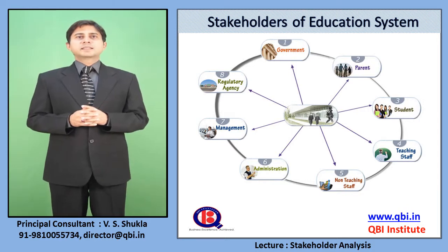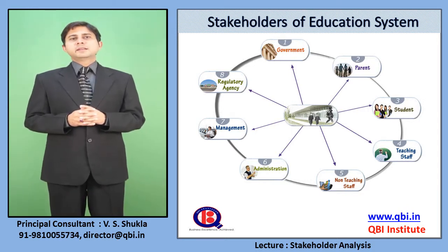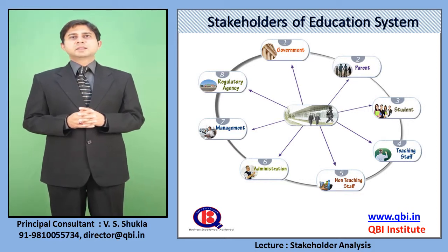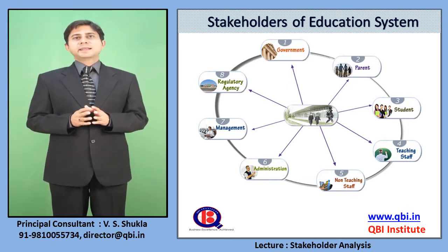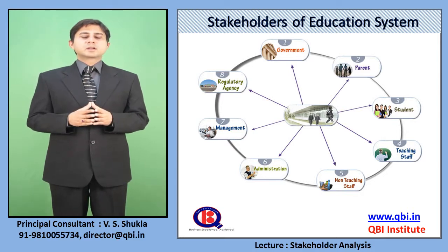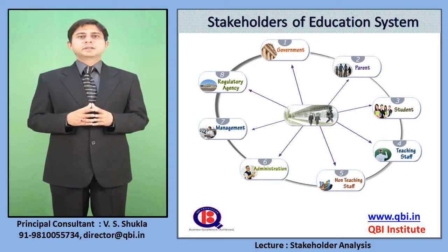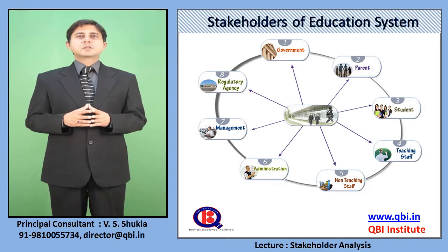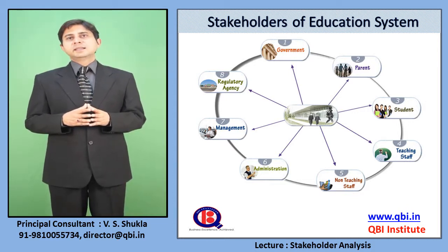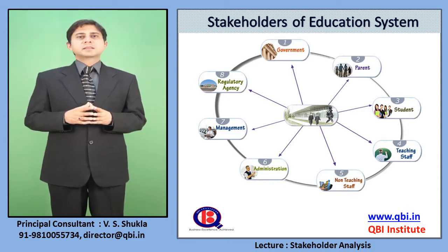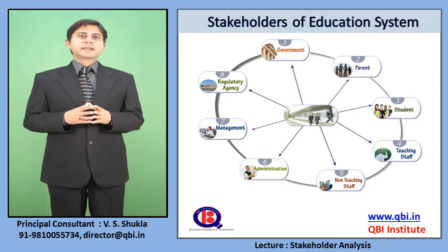Just have a look at this visual. Here we have identified the stakeholders of a higher education management system. They include student and parent. Of course, if you are going to implement a higher education management system which may include student administration, e-learning, fee payment, etc., students and parents are the stakeholders. Also the teaching staff, who may have a role in student administration, may be sharing the lecture notes, may be providing the attendance and all. Then the non-teaching staff, say someone who collects the fees.